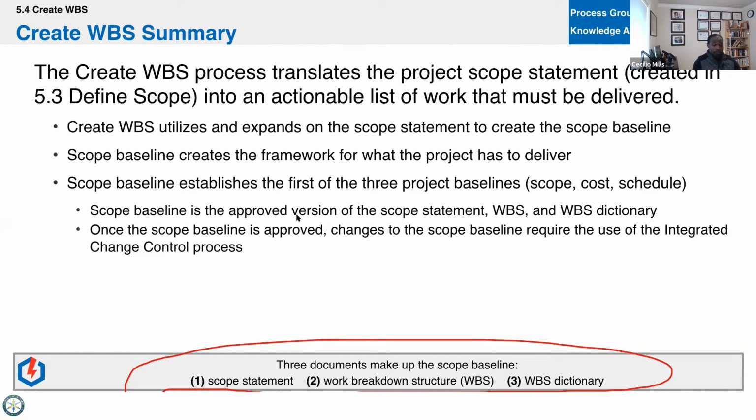No. Remember, nothing specific to your project will ever sit in any of those subsidiary plans. So the scope management plan is just going to say, this is how we'll develop the scope statement, how we'll get it signed off on, right? And then the scope baseline is its own thing that is part of the project management plan, but it's not a subsidiary plan. Okay, good one. That's one good thing for you guys to all remember in here. Nothing specific to the project itself will be in a subsidiary plan. The subsidiary plan will only contain the how, the management approach.